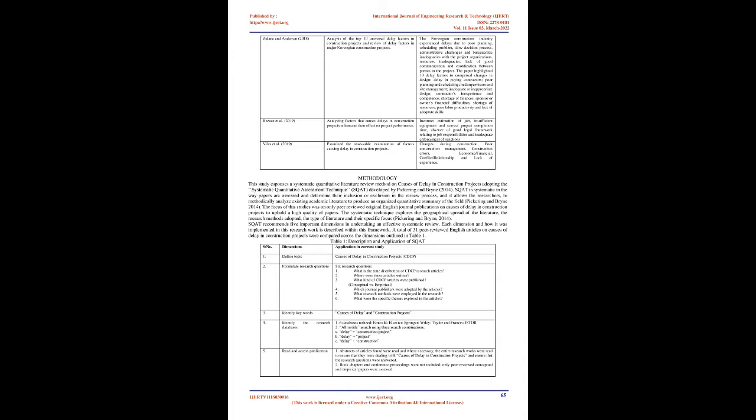The study indicated that the factors that cause delay in construction projects were delay in paying contractors, price fluctuation/inflation, increases of materials prices, insufficient finances from project sponsors, variation orders, and absence of good financial or capital market. The major impacts of delays are cost and time overrun, litigation, discontinuity by client, and adjudication.